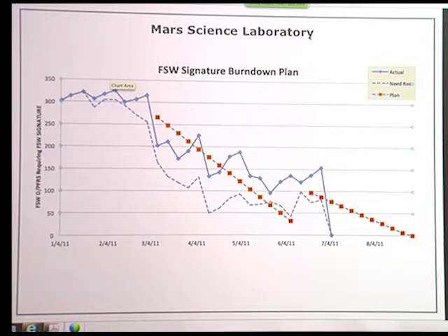And so we were trying to predict not only our rate of closing those out, but at what rate new ones would come in, which constantly exceeded our expectations. We thought we'd be mature and stable, and people kept testing and finding problems. Part of this was also because the test program was a little bit backlogged as well, so they were late to find stuff. But what Amalaye is showing on this chart is